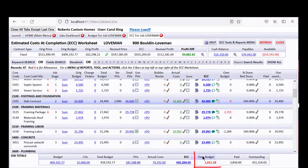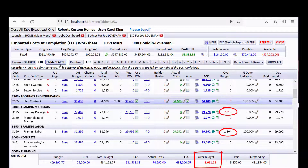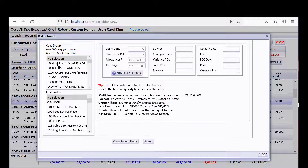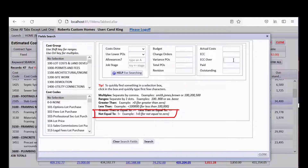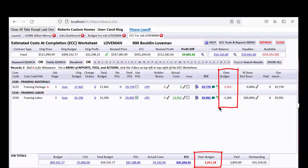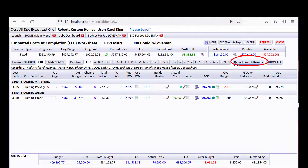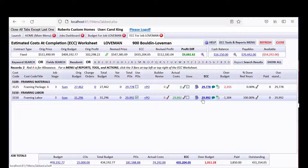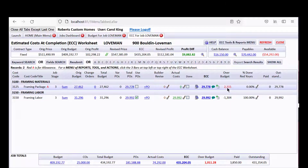Let's refresh the totals. We show over budget by $1,028 for these two lines. If you have a whole bunch of lines, you can use a field search on the ECC over column — type exclamation point equals zero (meaning 'not equals zero') and do a search. That way you only see the lines that have something over or under budget and can see how they total to our overall over-budget amount. What's so cool about the ECC is you can see every day, way ahead of time, where you're headed based on what you've entered. You can do a report of the results, drill down on all of them, look at comments and notes, and see what's causing the overage or under.